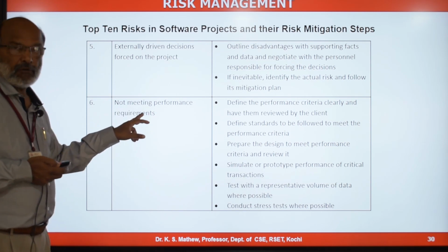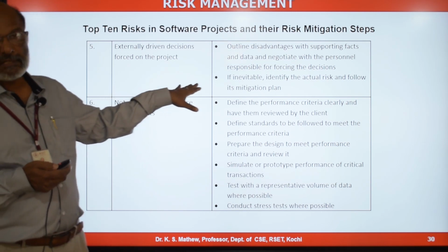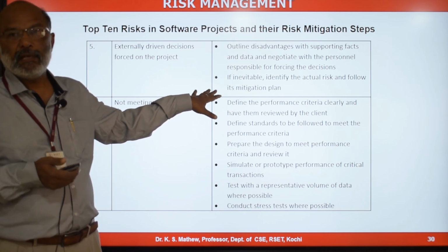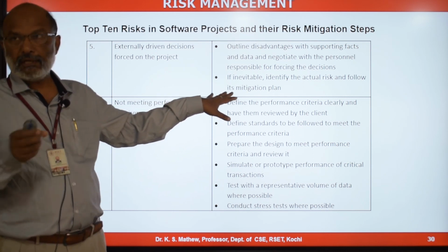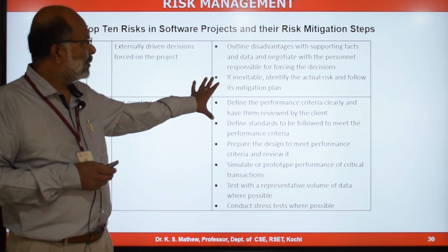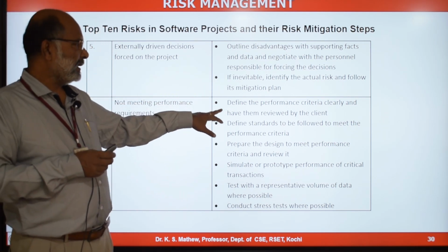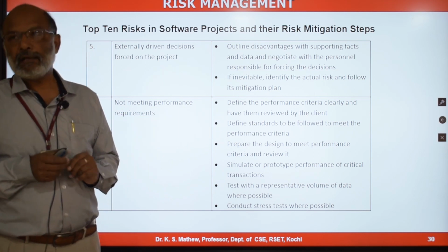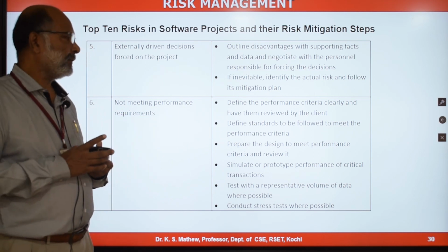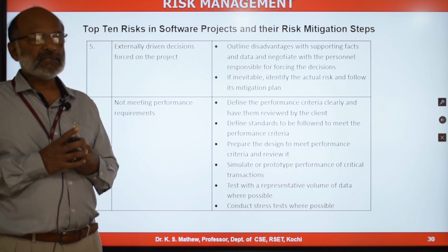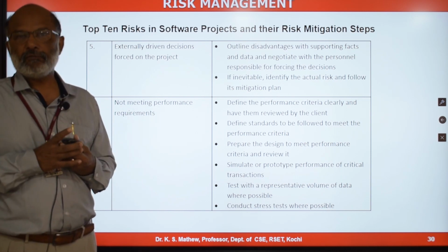Not meeting performance requirements. Some of the performance requirements stated by the customer are not practical or not achievable using the current technology. In that case, what are the mitigation steps we can follow? Define the performance criteria clearly and have them reviewed by the client. You need to document the performance criteria clearly, otherwise there will be confusion on the performance criteria when you are going to get the acceptance of your product.